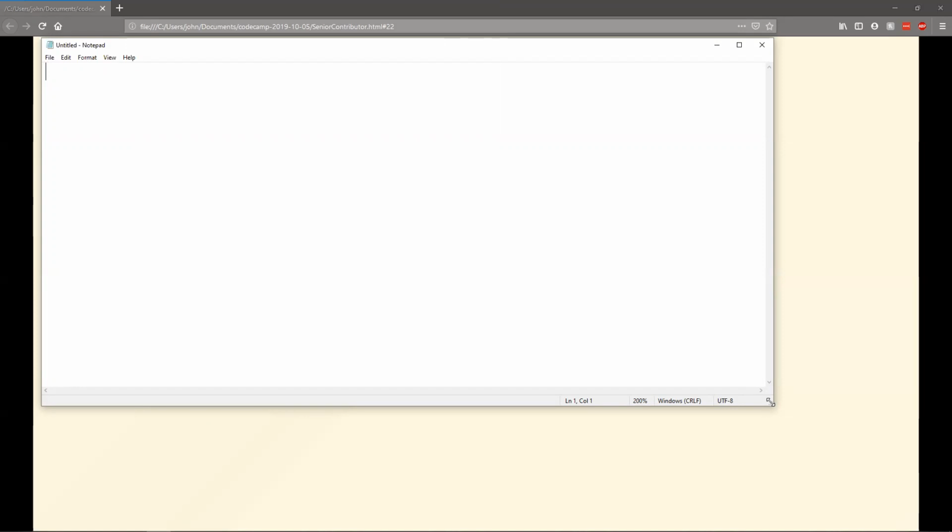The first heading, from the second retrospective onwards in this format, is actions from last retro. Hopefully this is easy, because you basically paste what you said last time about what actions you wanted to take. You paste that here, and then you make a quick statement of whether or not you did it, or you're not doing it, or you're going to give up on it.